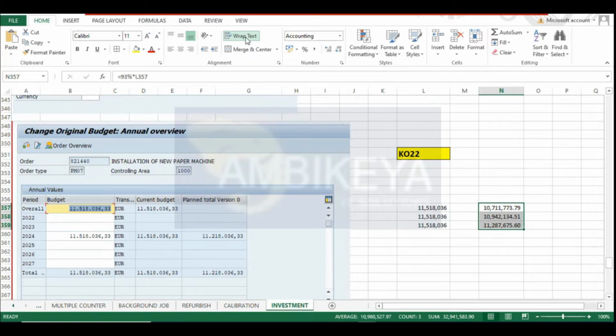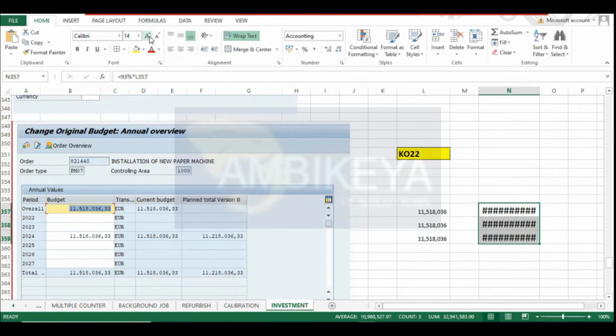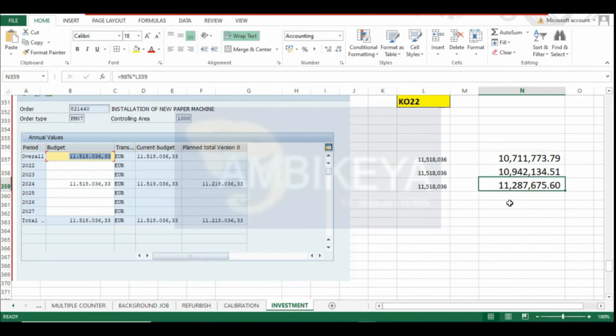Now we should get a warning message, warning with mail, and mail of course we don't get. We have to configure that workflow. Don't worry about that. Only the error message we will try. Warning message and error message we will see. Now budget is how much here? Already you should get a warning message. 92% of it, meaning it has gone above this, below this is 1 crore 7 lakhs 11,000. You should get a warning message, no?